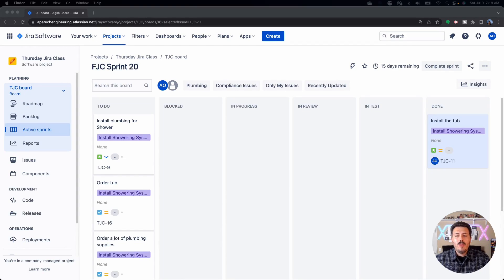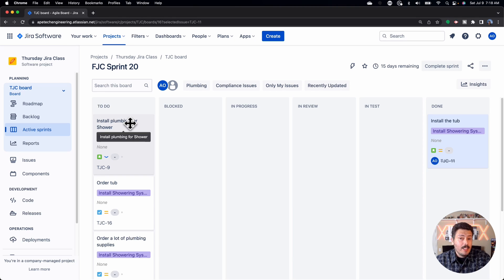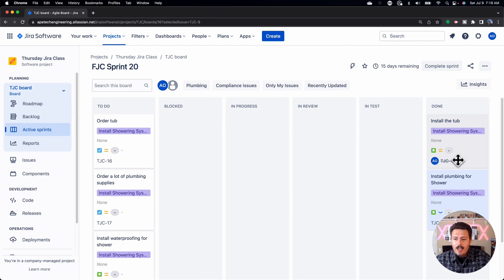Let's jump into Jira. Within the world of Jira, I'm going to show you what a resolution does. You may have noticed this already if you've been using Jira for some time — when you move an issue from pretty much any status that's not done into the status of done, the issue gets crossed out. This is really important because it tells Jira that the issue is indeed complete. In other words, it is resolved. Resolved versus unresolved is very key to driving a bunch of metrics in Jira.